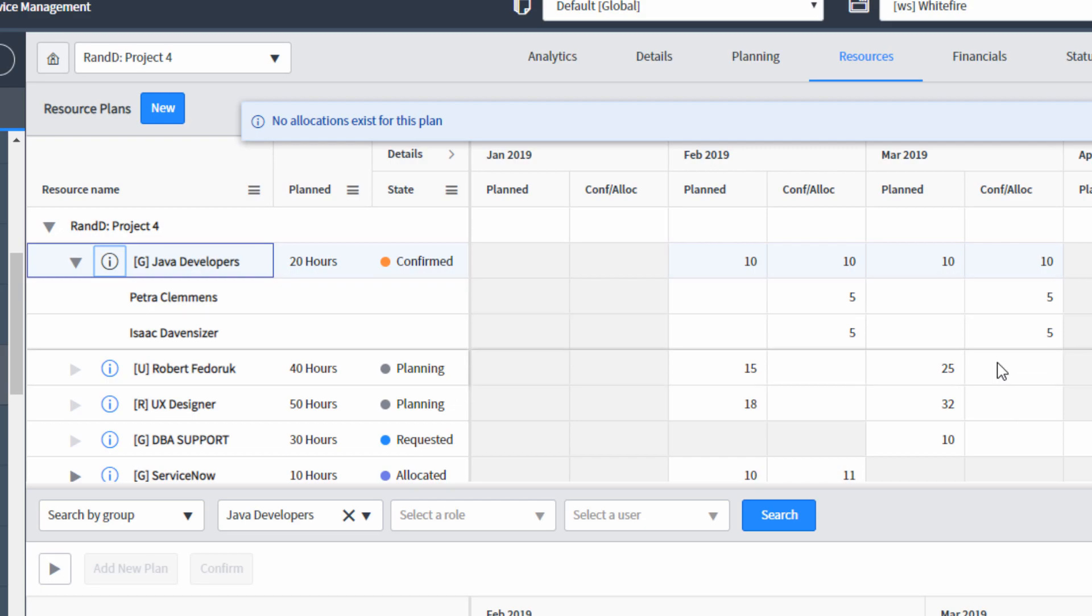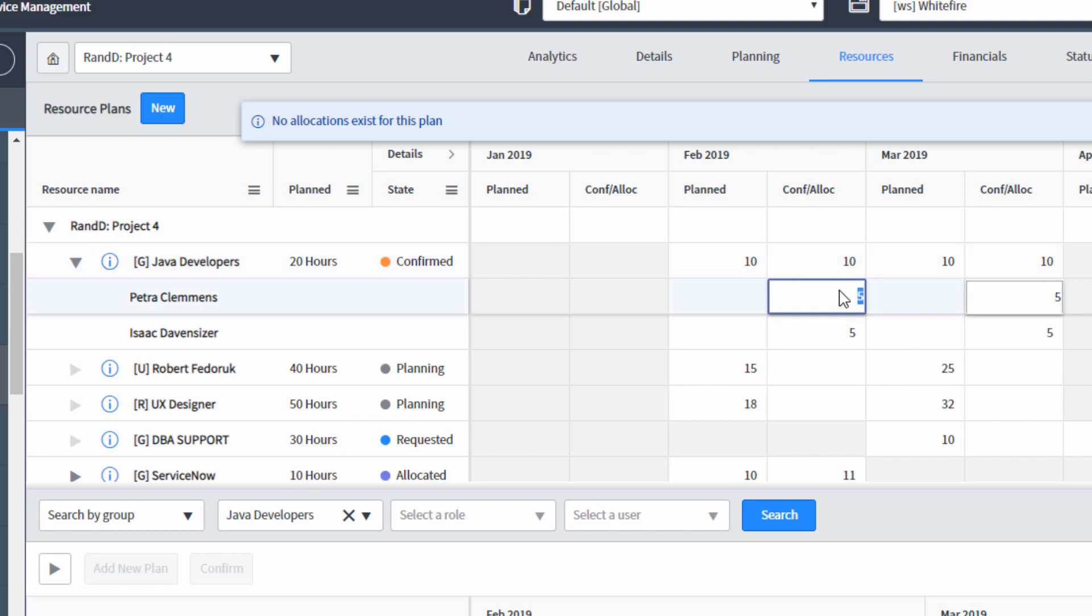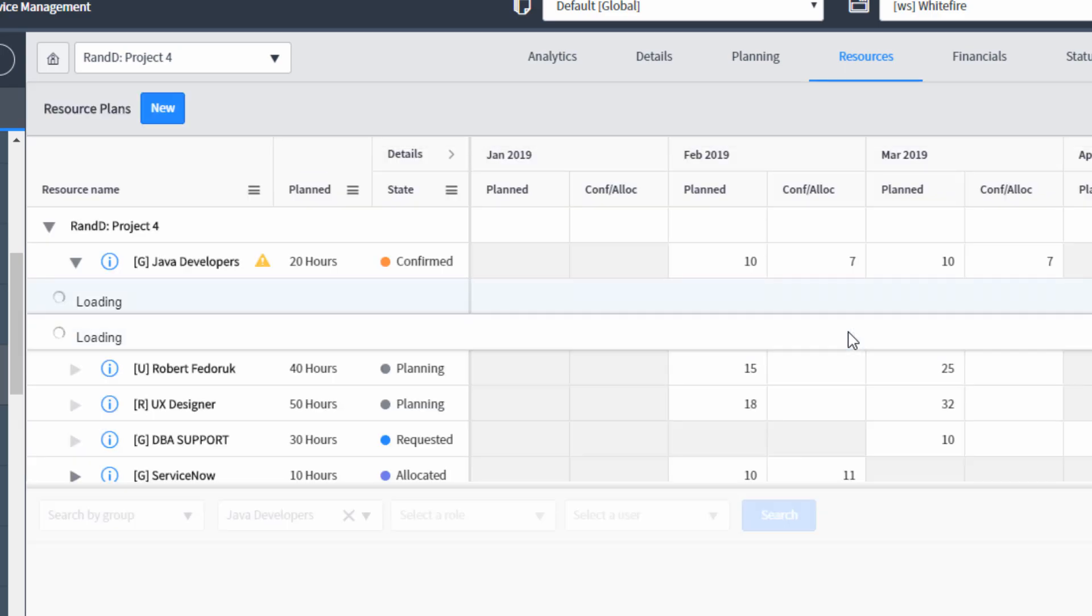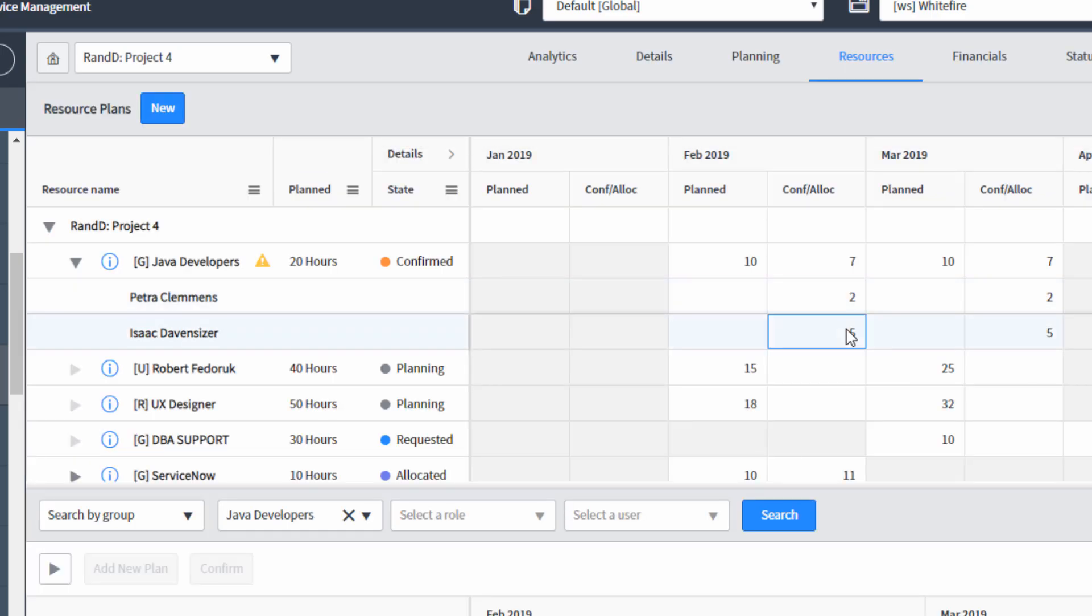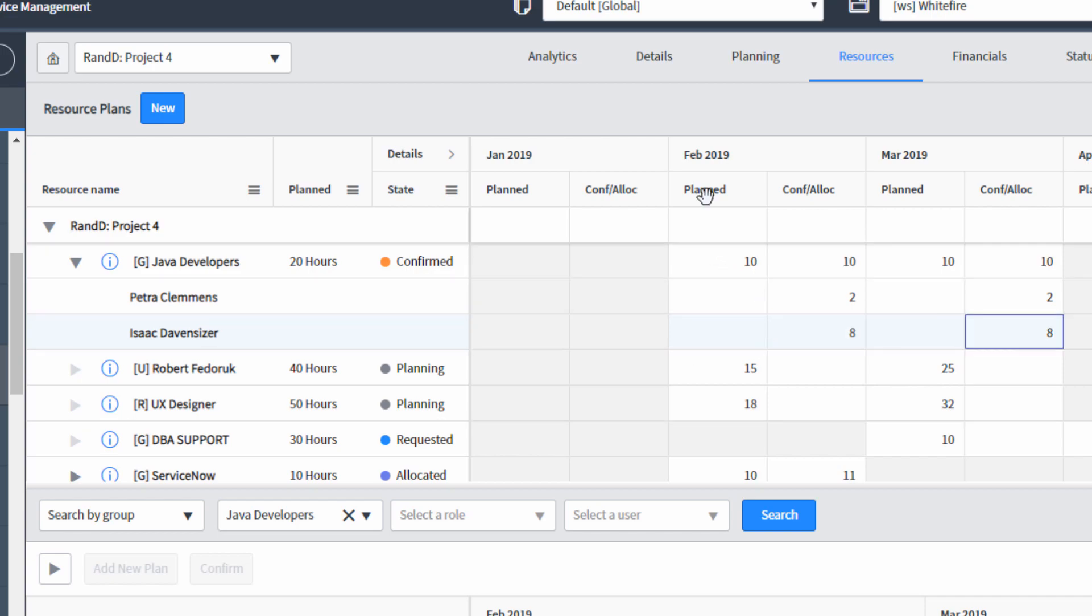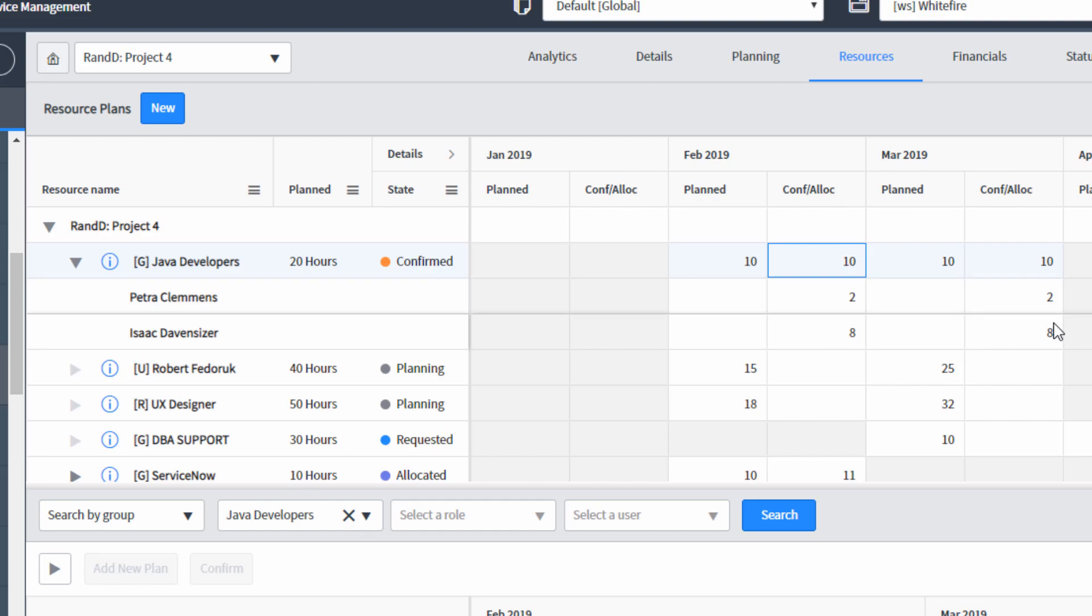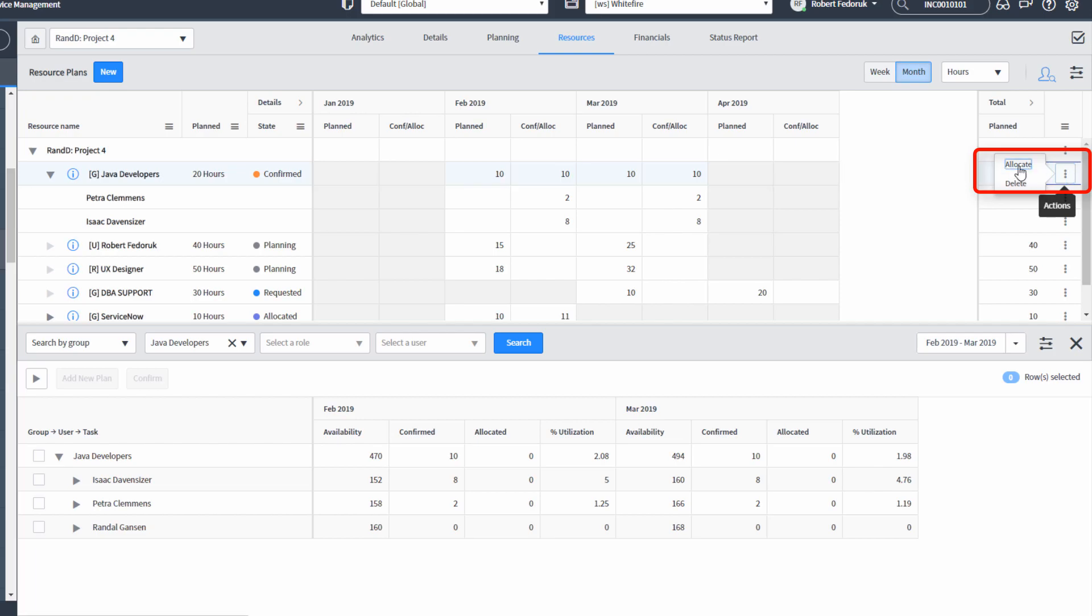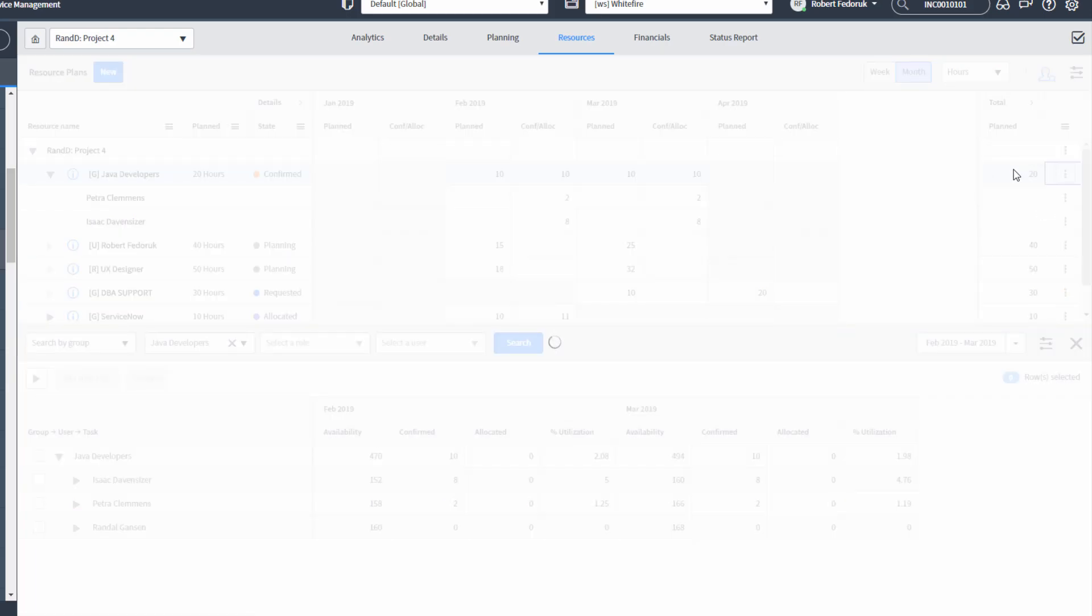From here, I could split it however I want. So maybe I want a two to eight split. I'm going to give Petra two and I'm going to give Isaac eight. And now we see that for February and March, 10 hours planned, 10 hours confirmed. And this is the split between the users. As a resource manager, if I'm happy with this, I can click on my action menu and click allocate.